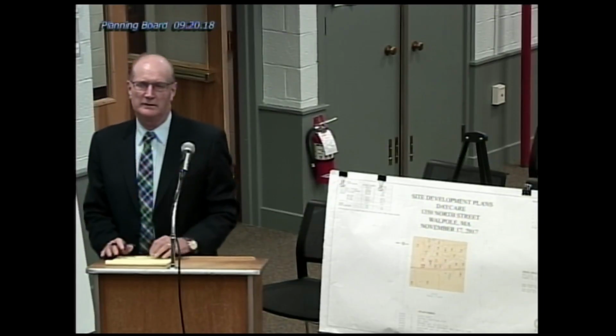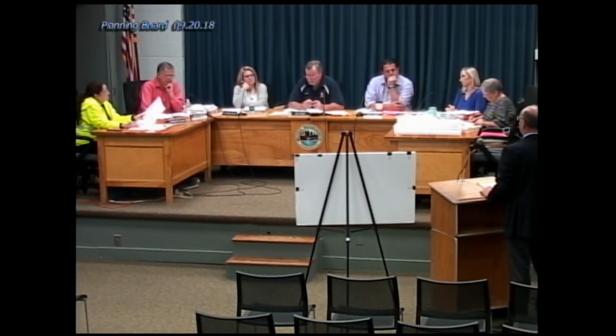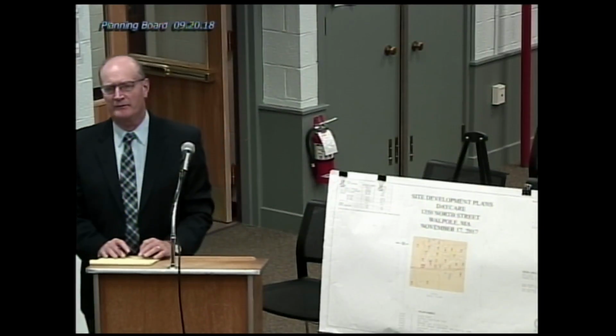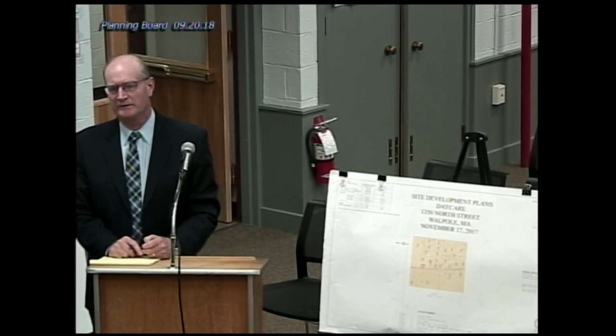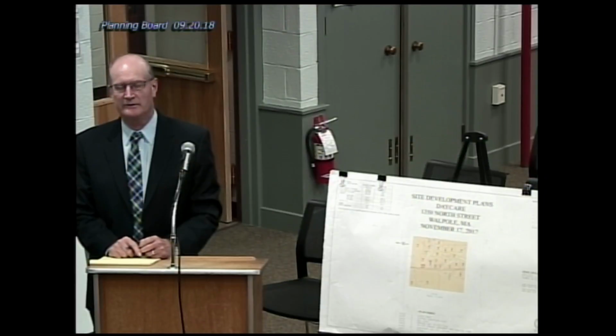Okay. Can I ask, what's the status of the septic tank design? So the Board of Health has asked us to do some additional testing, which we did yesterday, actually. We were going to do it Tuesday, but Lawrence came by and told us to wait till Wednesday. The soil testing was, for the most part, the same as what was done originally, so that plan will be submitted to the Board of Health soon. And we don't anticipate any issue with that.